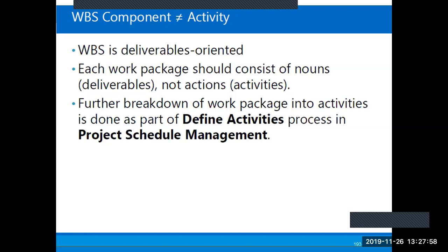Now, when we move into schedule and cost, we're going to see that they will take that same work package and break it further, decompose it further to activity levels, activities. So, activity list of activities, right? And the attributes of those activities. And then they'll be able to run estimates based on that and calculate all that budget or cost and schedule requirements.